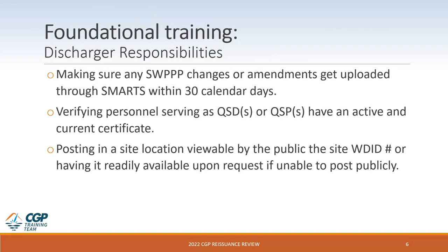Some of the discharger's responsibilities that the QSP delegate should be aware of. There's obviously a long list of responsibilities for the discharger, but these are just a few of the things that the QSP delegate should be aware of in order to perform their role at the job site. They need to understand that anything that changes at the job that would require a change to the SWIP must be made through SMARTS within 30 days.